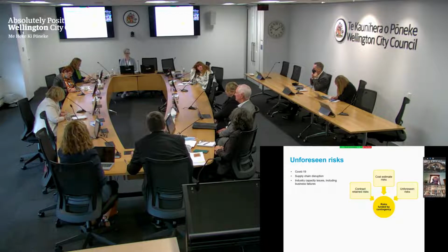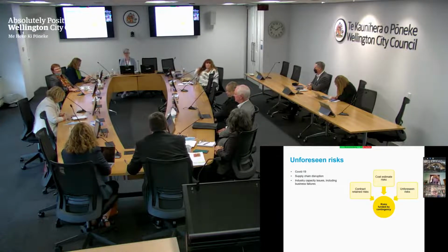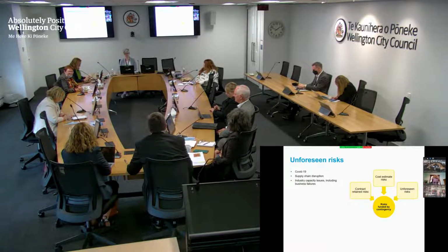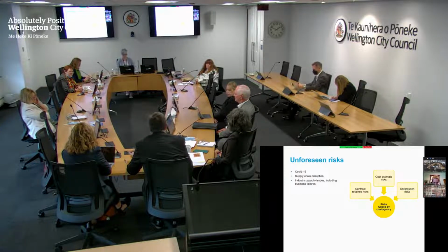Supply chain disruption, some of that's a factor of COVID, but some of it's also a factor of the New Zealand construction market being very, very much out of balance. There's more construction going on than the supply chain can keep up with and manage. So on other projects, we're seeing staples that you would just normally rely on, jib board not being available, 4x2 timber not being available.